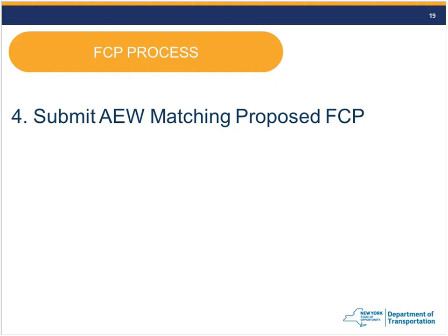I'll jump in there too. Sometimes you're going to end up with a couple AEWs to get an FCP out. I'll give you an example. We had a pretty good overrun this summer on a contract where we had to put in extra footing concrete because the rock wasn't where everybody thought the rock was. So right off the bat, we knew we had a big overrun. So the EIC submitted an AEW just to cover the overrun and what we projected it would be before we even did the work. So we had an AEW in hand to take care of this.